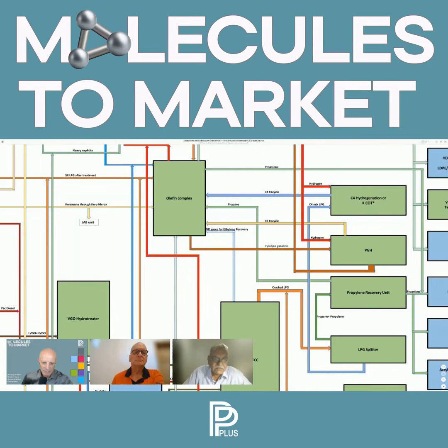The BOO plants are those where we define just the battery limit. Only land is given and maybe some resource. I give him coal or coke, for instance, and ask him to set up a power plant. So right from technology to implementation remains with the BOO contractor. The advantage for the owner is that this does not come in the capex. It only comes into the OPEX part, because when I get something from the BOO contractor, it will be at a certain price. So it will form a part of the operating cost.